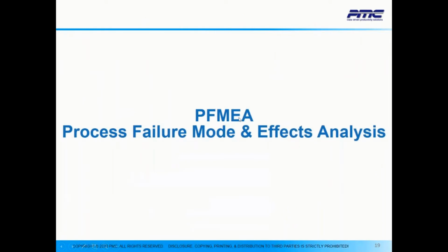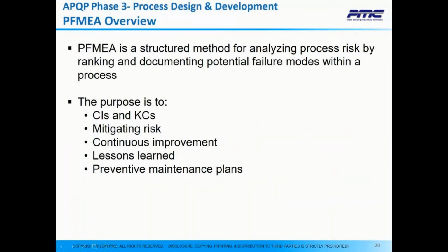While we're in phase three, as I said, PFMEA is one of the key documents, key tools that we're going to have to develop. The PFMEA is a structured method for analyzing process risk by ranking and documenting the potential failure modes within a process. The purpose here is to assist in the identification and evaluation of critical items and key characteristics, prioritize action plans for mitigating risk, serve as a basis for continuous improvement, become a repository for lessons learned, and finally, help develop preventive maintenance plans.